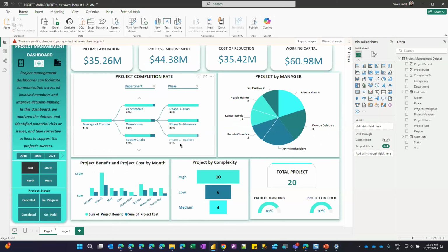But when you put in perspective right beside that the forecasted cost and actual cost, and you see those numbers together, say my forecasted cost is 35 million, I'm just giving an example, and this is actual. Just within a second, you can tell that I have gone more than forecasted. It is bad. So KPIs are the numbers that give you an idea about the trajectory your business or project is going in, in a second. That is why all the tops are KPI.